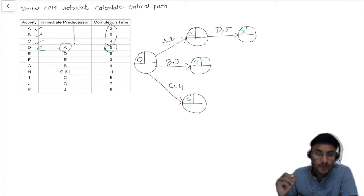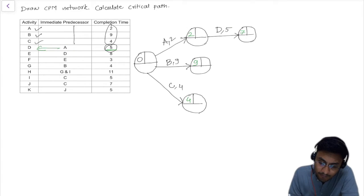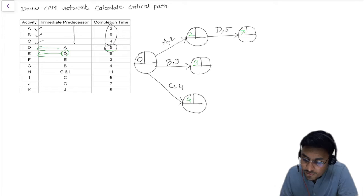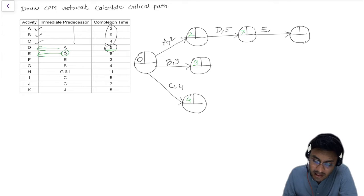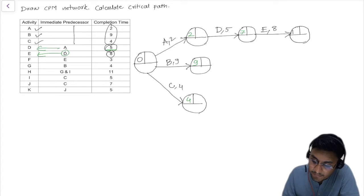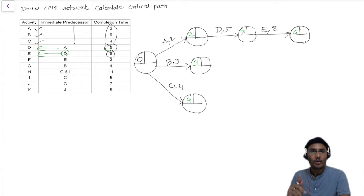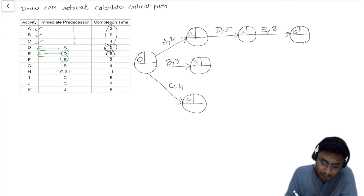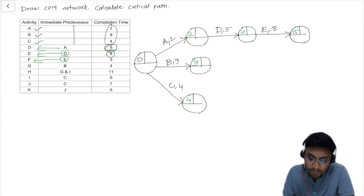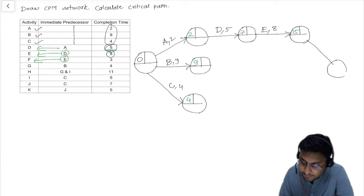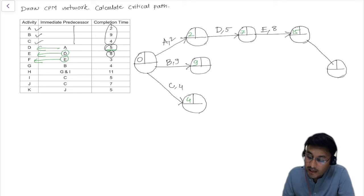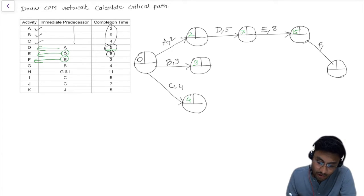Once D activity completes, E activity will start, which has a duration of 8. So 7 plus 8 becomes 15. Once E activity completes, F activity will start, and F activity has a duration of 3.